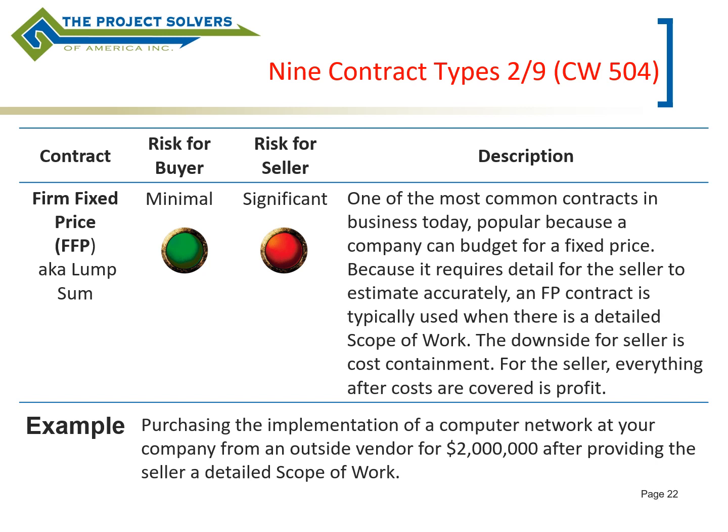The problem with the seller is that if you haven't estimated correctly on this type of contract, you could end up having too low of an estimate to the extent that it doesn't cover all your costs, and therefore you're not even getting any profit. So you could lose money on such a contract.